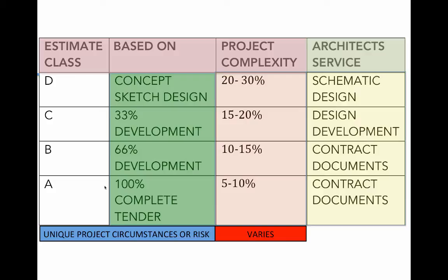So what we like to do in a project is we will ask for a budget estimate right after we're awarded the project. If we're awarded a project and we have enough information, we will initiate an elemental cost analysis and look at all the pieces, and then we'll have a good understanding with good confidence. And that's the best time to address it with the client.